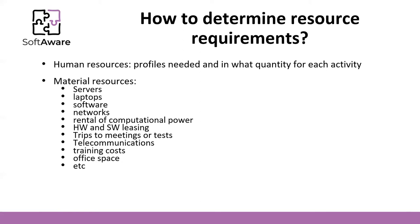Cost comes from the effort and we calculate the cost based on two main issues: human resources — profiles needed and quantified for each activity — and material resources. Material resources include how many servers we need, laptops, software packages, networks, rental of computing power, hardware and software leasing, trips to meetings or testing, telecommunications, training costs, office space, and so on.